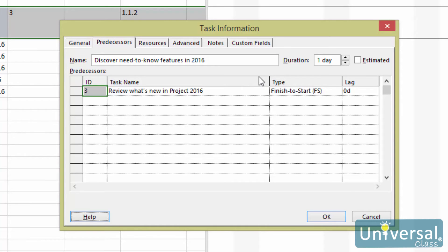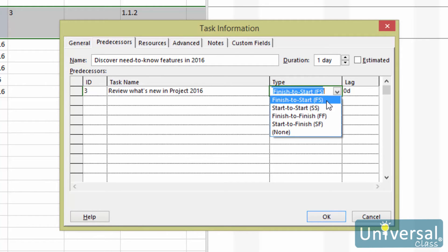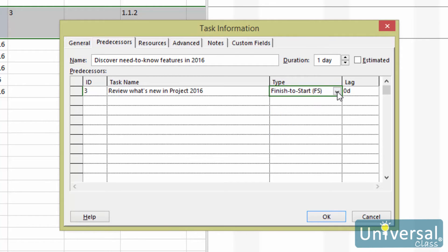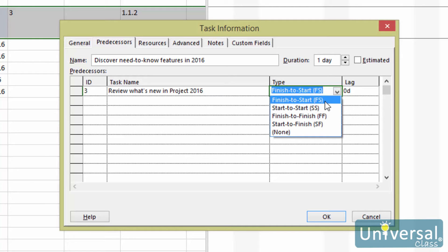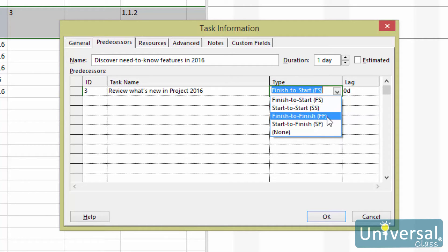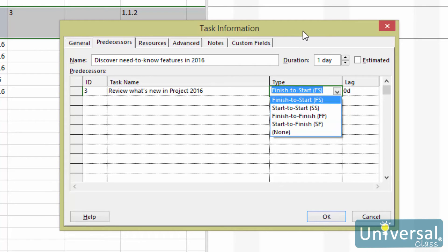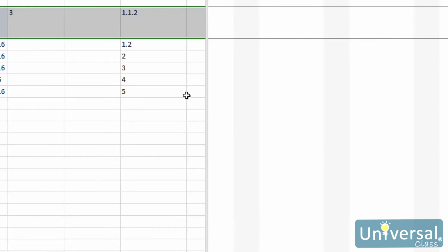Click the Type field and click the arrows to view dependency types, then click on the appropriate dependency. The dependency types are: finish-to-start, which we already covered; start-to-start, where the start of one task determines the start of another; finish-to-finish, where the finish of one task determines the finish of another; and start-to-finish, where the start of one task determines the finish of another. Click OK when you've selected the appropriate dependency.